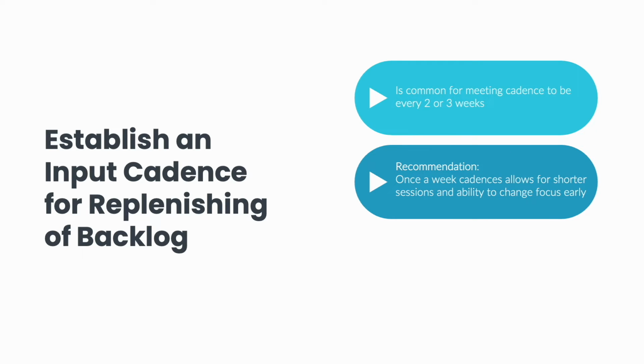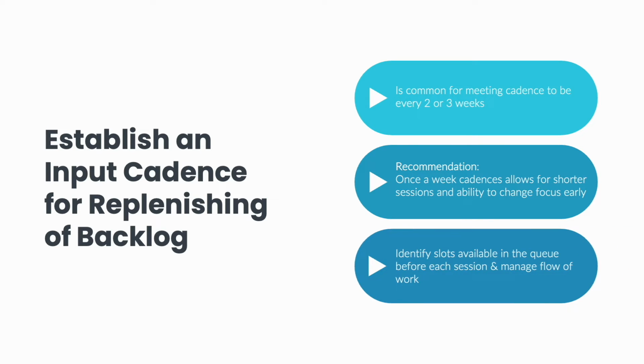To increase your efficiency for this session, you can email your product lead or business stakeholders a day ahead with the number of slots you think the team should have available. That way they can go over the backlog items themselves and come prepared to the meeting with the next items they want to prioritize. Once you have identified the next handful of work items which should go in your ready column, your development team will start working on them.